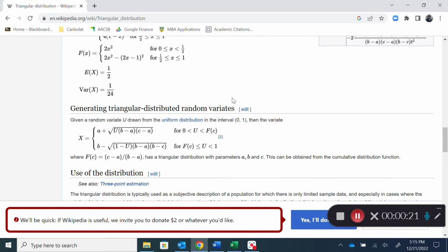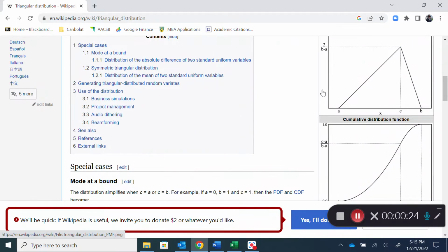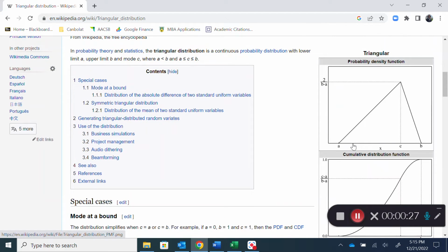If you do not know what a triangular distribution is, it is going to have a shape like this, and the activity duration could be anything in this range. What we call the lowest value is the optimistic value, then the task duration could be the most likely value, and then the highest. It is going to be very low probability for that activity duration to be at either A or B, but it is possible. But there is no possibility of going outside of these ranges.